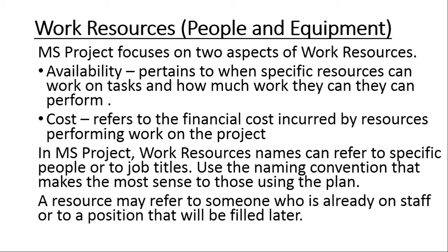So a resource may refer to someone who is already on the staff or to a position that will be filled later. Remember, we are working on a plan. Therefore, we do not need to have all the resources in advance. We can put on our plan a resource that is going to be hired 12 months down the line. So all we do is we simply put the job title or the description of what type of person is going to fill that position.